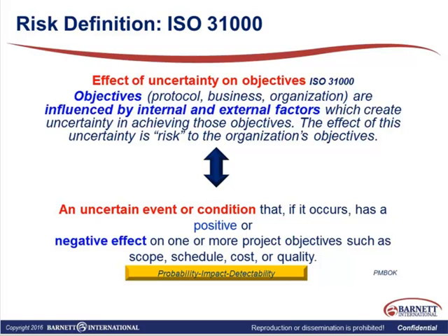The example I like to provide regarding a positive risk happened to me personally when I was running clinical trials with a biologic product: rapid enrollment. I was in an early phase 2 study. It was a biologic, and we had some challenges with our manufacturing process. We only had one lot available for multiple clinical trials. So when I hit enrollment early, I had to look at whether I had enough drug supply.